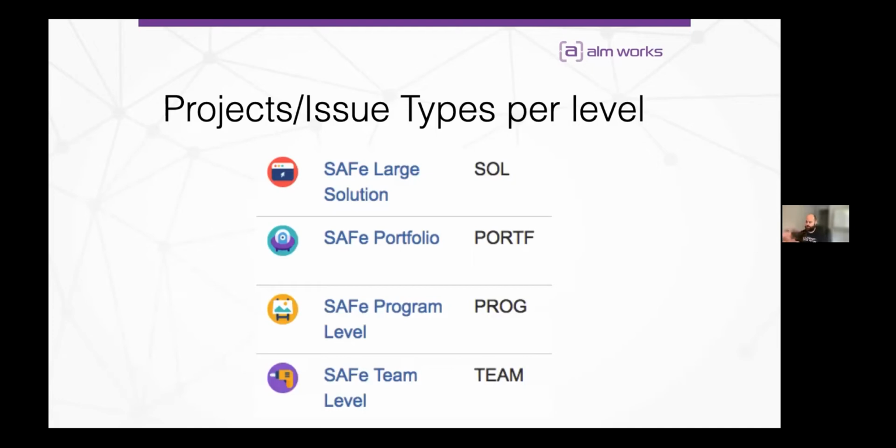Jira also has, obviously, Jira projects. For those of us who've been doing this for a while, Jira projects don't always map to actual projects or even products. But essentially, over the hundreds of conversations I've had with customers, the rule of thumb that works most of the time, I think, is you should have a separate project for anything in the program level. So everything above the epics. You should have a separate project, Jira project, at the portfolio level. So whatever you end up calling that, whether they're initiatives or whatnot.